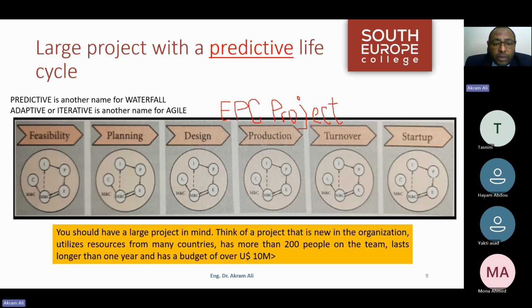So here my example is, if I have such a project, I have a go, no go. Each one of these light colored lines is a phase gate, or a go, no go, continue the project or stop the project decision point for senior management. So my first charter as a senior manager was somewhere here. So here at this point, I approved a charter and budget for a feasibility study.